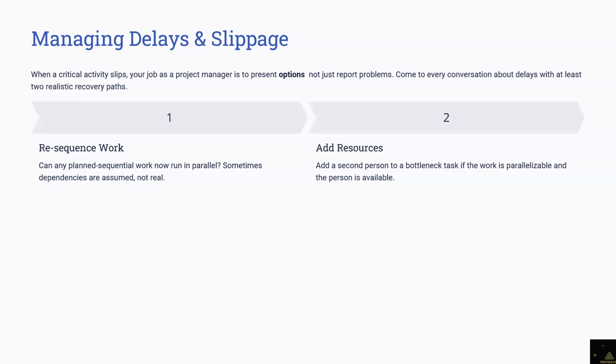Certain communications, you take them off email and you take them to Teams, because we want to get a very fast response in chat. I chat with my client a lot on Teams for fast communications. Usually the cost controller guys, once we agree on something while chatting, it's an easy way to talk. Then we move the final agreement, whatever we discussed and agreed on Teams, I'll send it via email. So please be careful what you send via email, please.